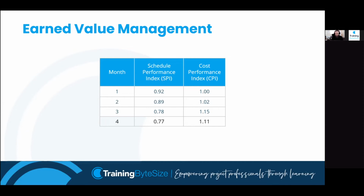So just a quick reminder, with a performance index, 1 is best because that shows we're meeting the plan exactly. That would be all the lines on a graph overlapping each other. Less than 1 is worse than expected. That would be where the earned value line is above both the planned line or the actual cost line. It's going worse than expected. If the number is greater than 1, it's going better than expected. We're ahead of schedule, or we're under budget, we're underspending. So that's more of an exam point of view earned value management talk for that bit.